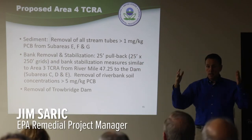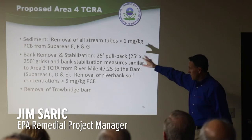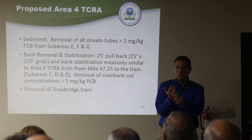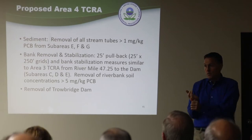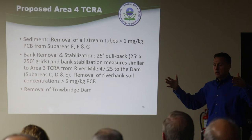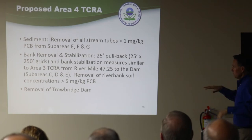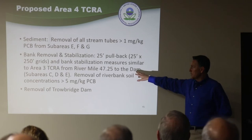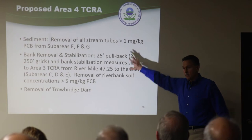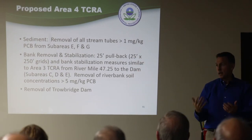So in-stream, the idea of this time-critical removal action is we're going to remove all the sediment that's greater than one part per million in those sub-areas E, F, and G — the downstream sediment areas. We're going to remove that sediment, stabilize the banks with about a 25-foot pullback to make them stable from an area about two and a half miles upstream of the dam, and then remove the Tropage Dam. That's all the work that this removal action is going to do.